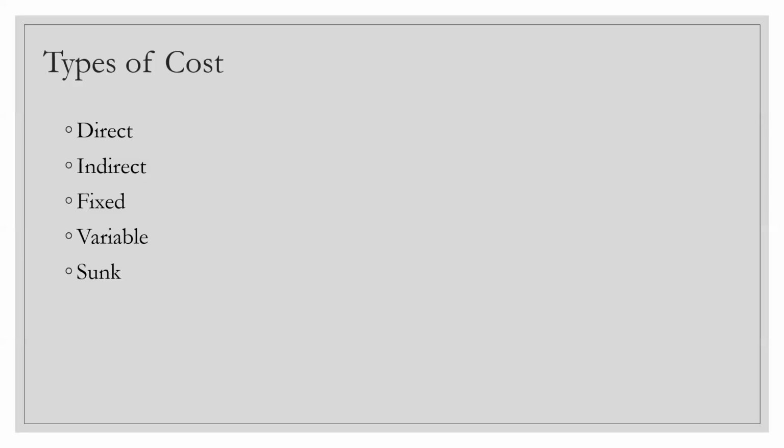That's definitely a cost to the project, but it's an indirect cost. It's not a direct cost which is linked to that particular project, because you can use that building to run multiple teams and to run multiple projects at one time, right? And those multiple projects can be lined up for multiple clients.